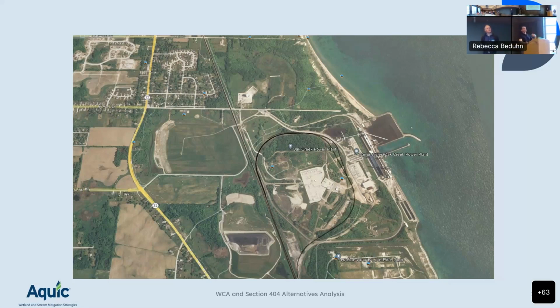So we had this drawn-out discussion. And I actually had to get to the point where Chad mentioned the screening criteria. I call them planning constraints, but the factors that help them make a decision. And I can't believe that for a $2 billion project, they didn't have all this siting criteria and all these things that they looked at. But I had to pull it out piece by piece so that they were able to tell their story.